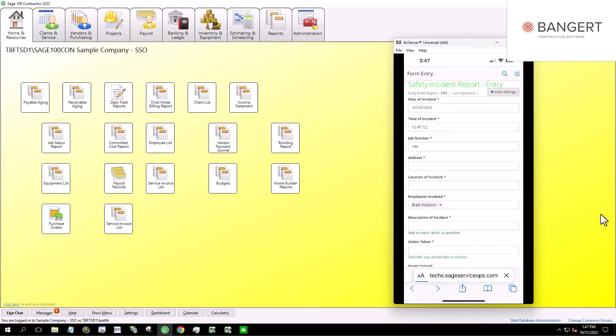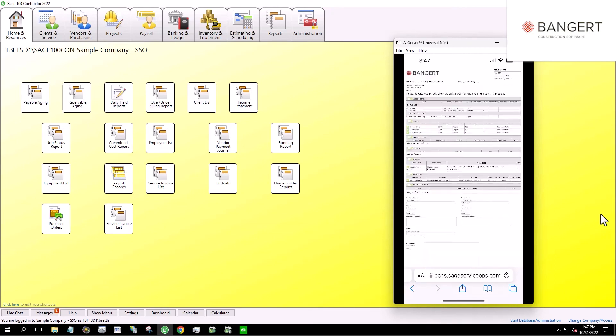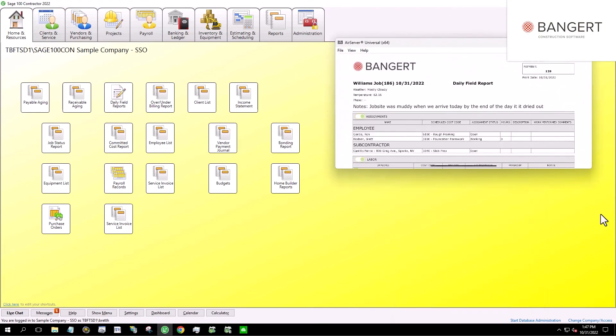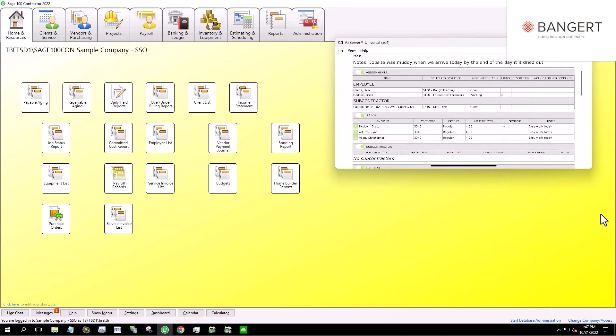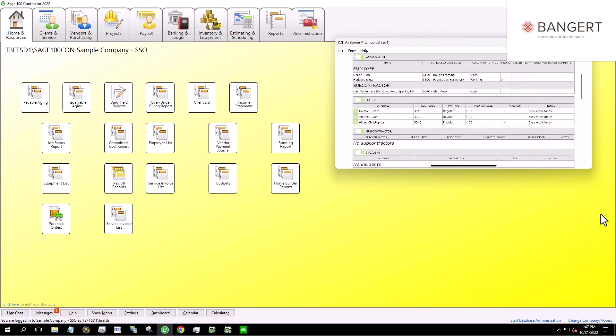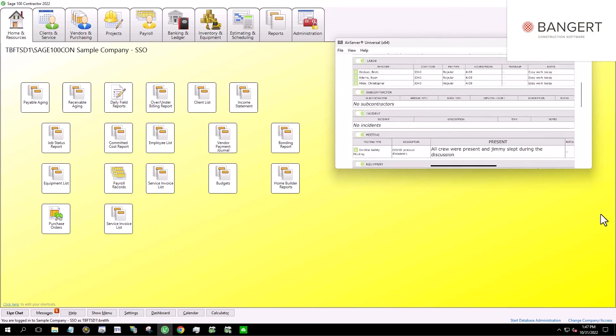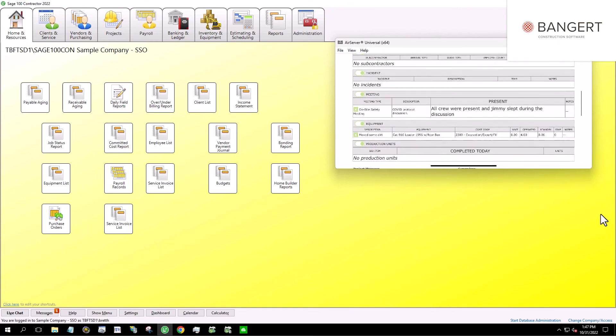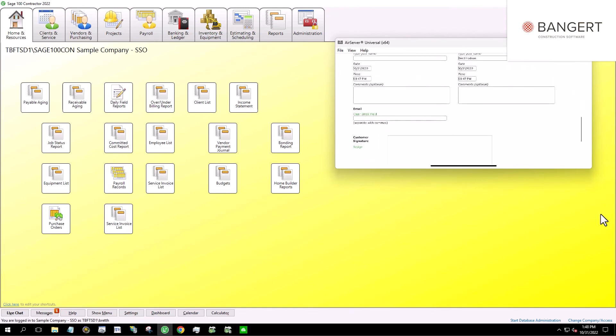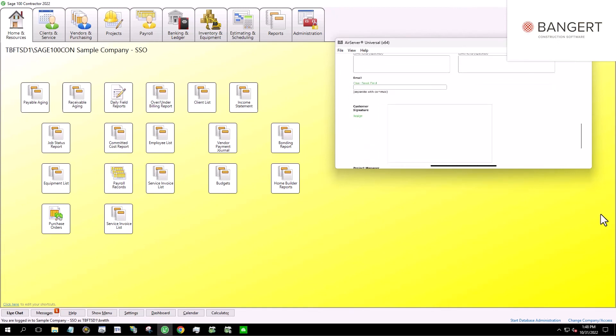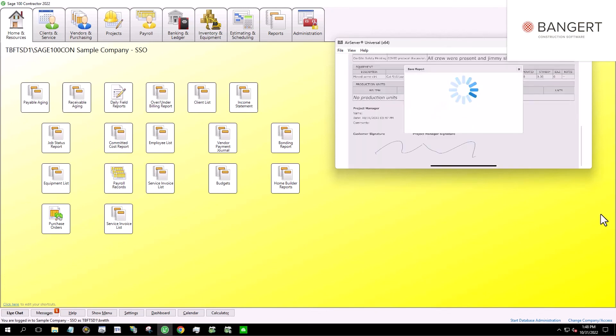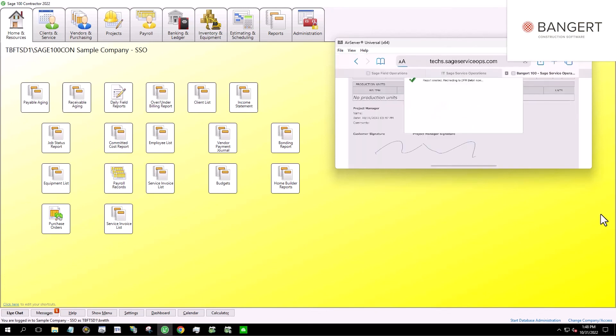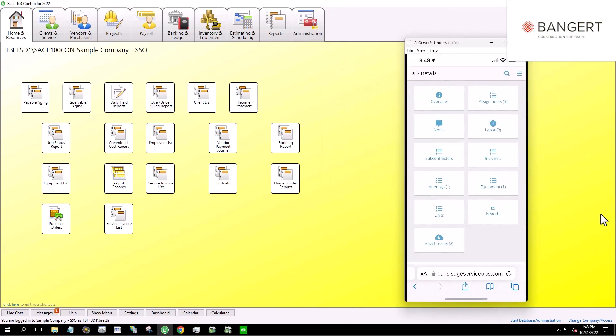So let's just go back to the field report now. And I'm just going to generate the daily field report. And I'm going to turn my phone sideways to make this a little bigger. So there's the note job site was muddy, we have some labor time, we had a safety talk, we moved some dirt, and that's it. So we want to get a signature from the customer, signature from the project manager, and we're through. Now, if we wanted to, we could also attach photos, that sort of thing. Now I'm done. And I can move on to the next thing in my list. So we've filled out a daily field report.